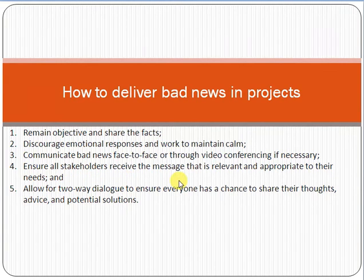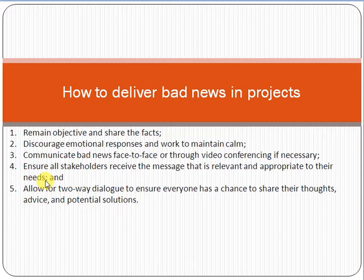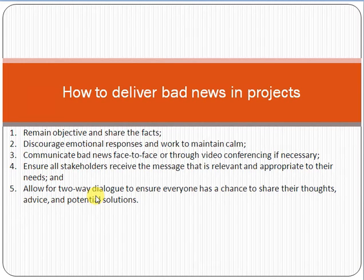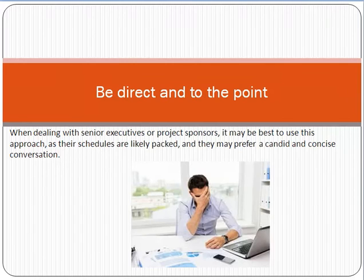Ensure that all stakeholders receive the message that is relevant and appropriate to their needs. Whenever you are giving bad news that is relevant to more than one person — for example, four people are affected — try to conduct a session rather than giving each resource the news individually. Try to give the relevant information or bad news to all the people simultaneously. The session should be a two-way dialogue where people are talking to each other, giving their feedback, and you are responding based on their feedback.